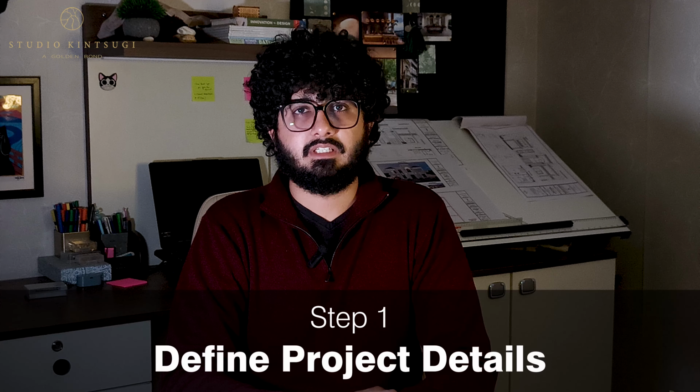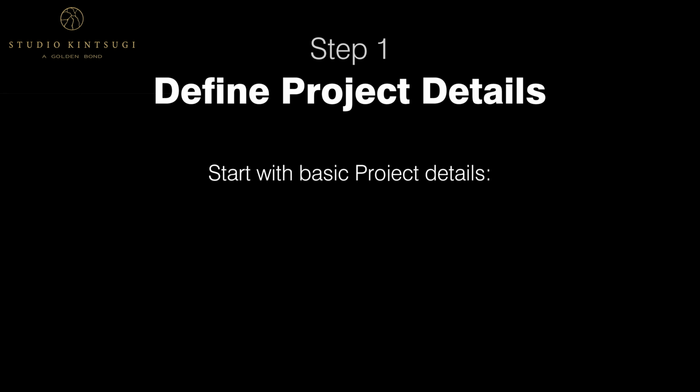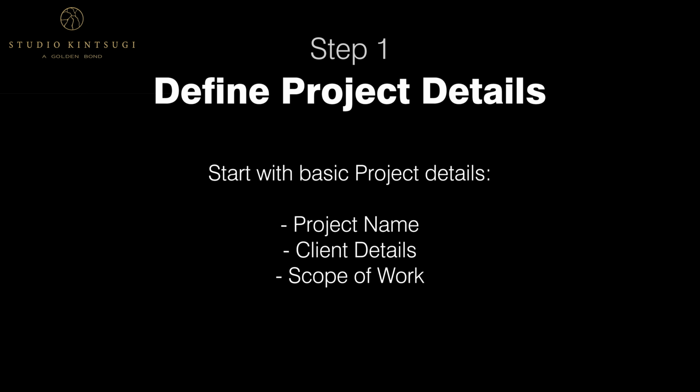Now let me walk you through a step-by-step process to prepare a detailed BOQ. Step 1. Define project details. Start with basic project details like project name, client details, and scope of work. Also mention the date and reference drawings.